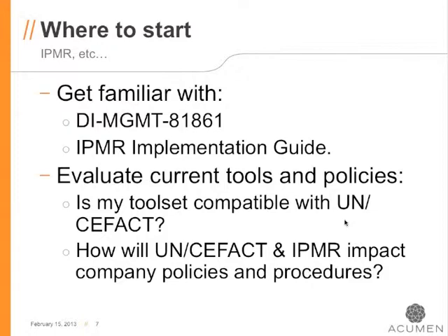Now the next question, and this one can be a little more involved, is how will UN/CEFACT and the IPMR DID impact your company policies and procedures? Now, I'd love to give you the answer for this, but in order to do that, I would have to look at every single company policy and procedure. That's why I say up here, get familiar with the DID itself and the implementation guide. Look at your existing weekly, monthly, quarterly, annual processes, and make sure that you'll be able to comply with the information that is in the DID.